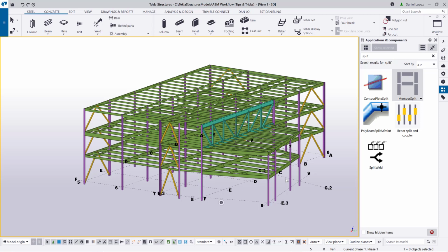Also, an ABM can be released by sequences or a particular area, but typically no revisions are needed in an ABM. That is because if there is a change in an ABM, in most cases it should be a change order, right? Which is a totally separate process from this. Really, at the point of an ABM, the purpose is to buy the material as soon as possible, but in a safe way. So if you know in advance that there will be changes on material sizes, for example, it's probably better to just wait till you know the final information and then generate the ABM.